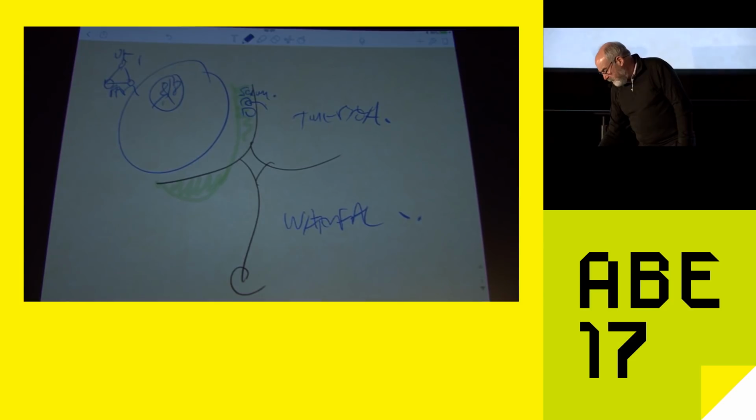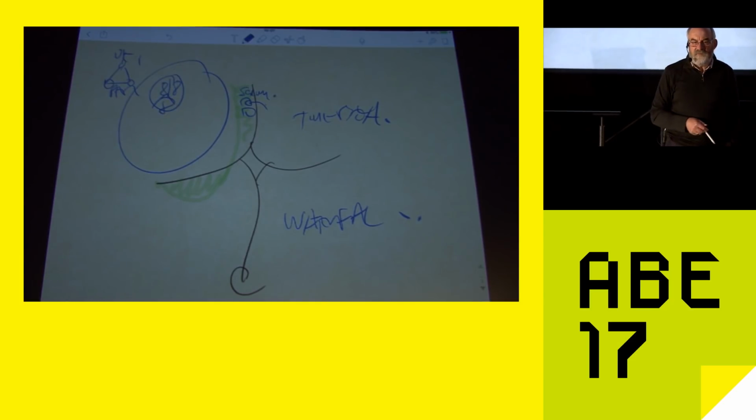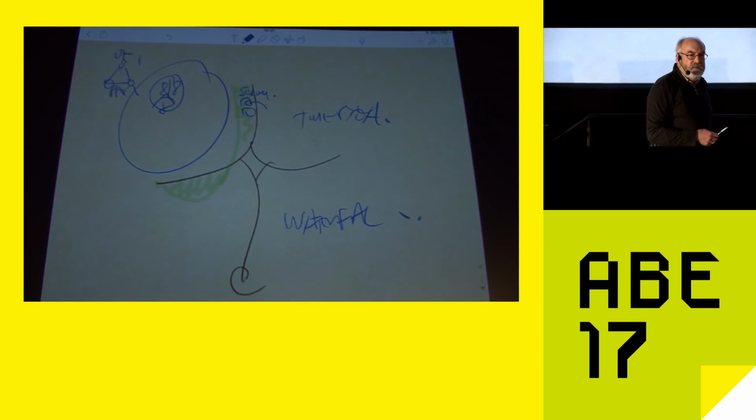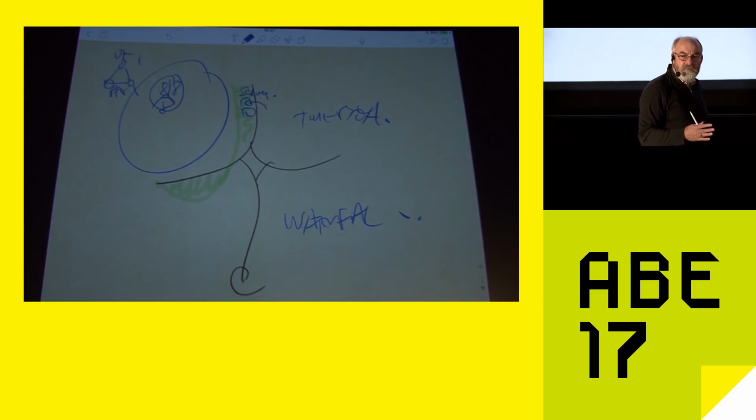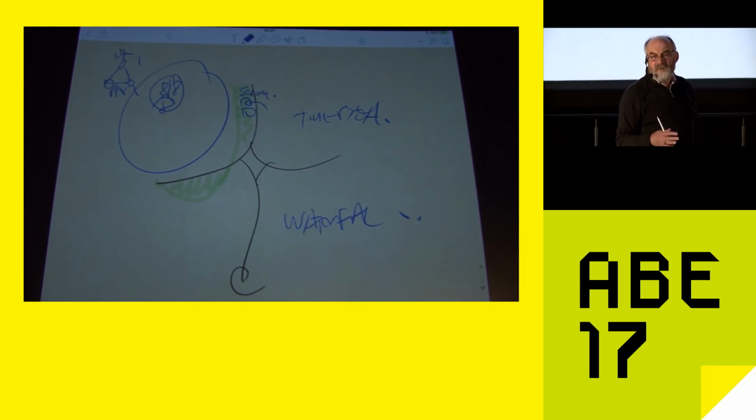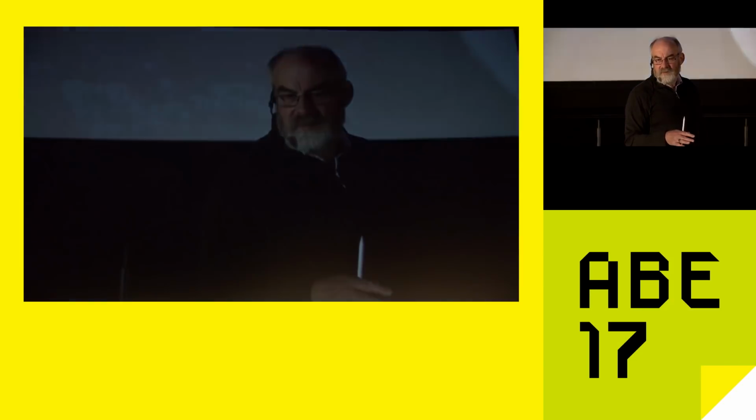In the 888 method, this is something I developed when we set up DSDM many years ago, is basically you get a JAD team, a joint application design team, prototypers trained to work with users, and good prototypers are generally poor executors of operational code. It's kind of like the two abilities don't go the same way. They work together with the users over 8 hours. They throw the prototype onto another team, to say they do that in London.